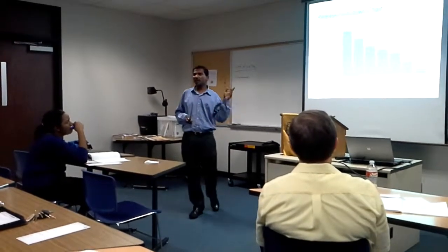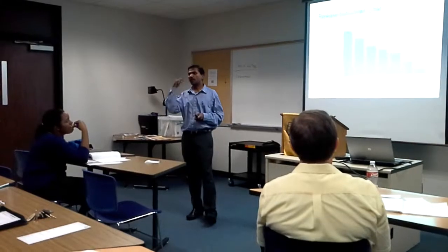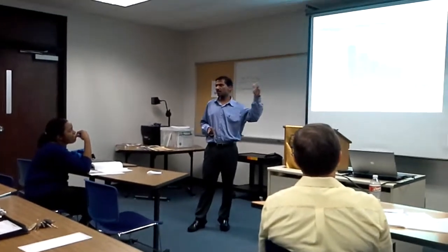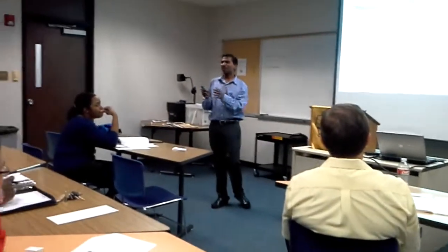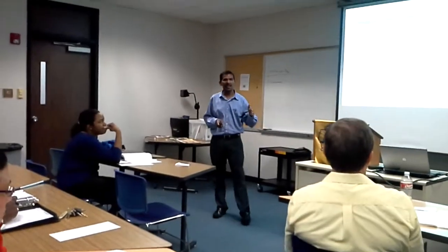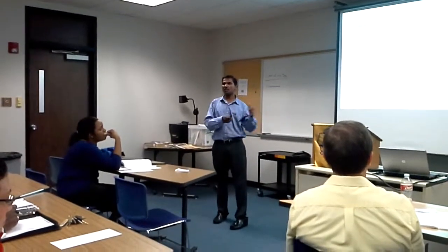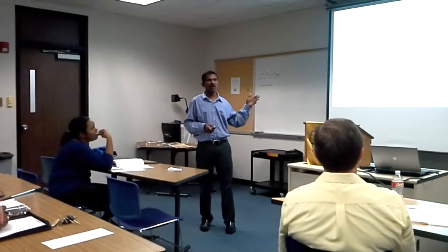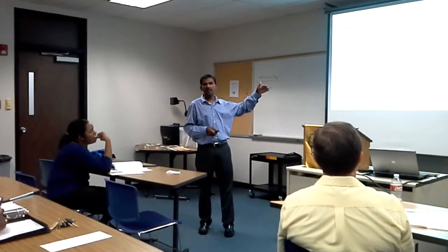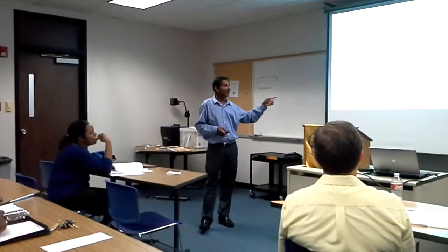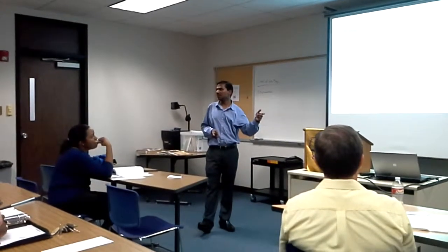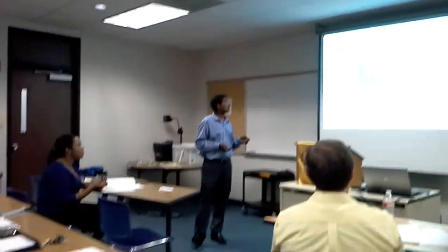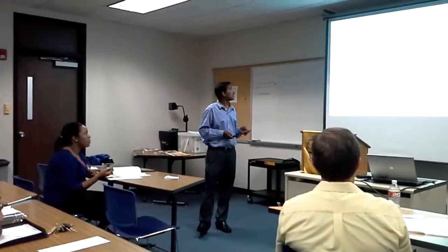During a release of a product, in the beginning you decide what features you want to put into this release. Those features belong to one of the sprints, so you come up with all these sprints. You combine all the sprints that go with the release, and you identify where we are within the sprint, how long it's going to take, and whether we made each sprint on time or it went up and down. Based on that, you find out whether we are going to release the product on time. So this is another feature of the release burn down chart.